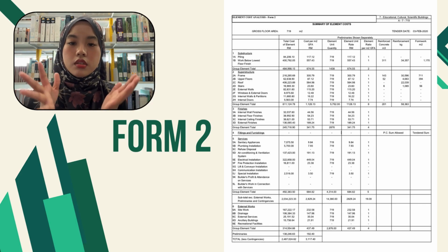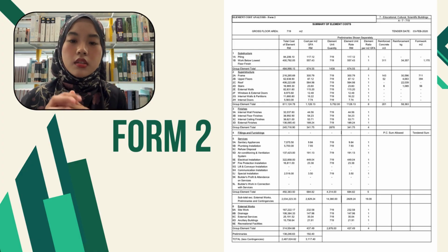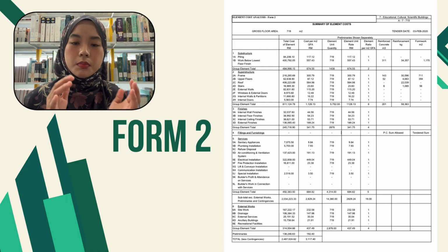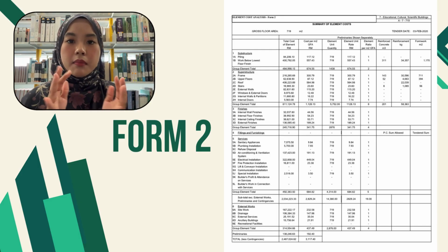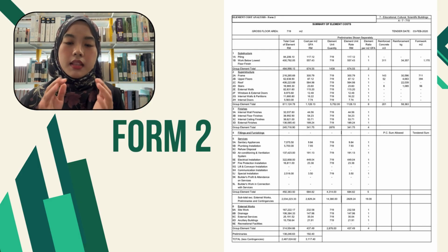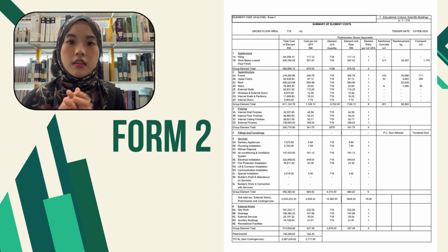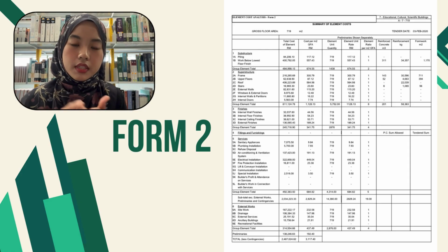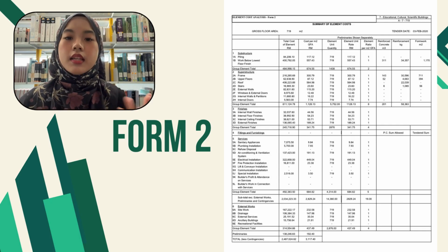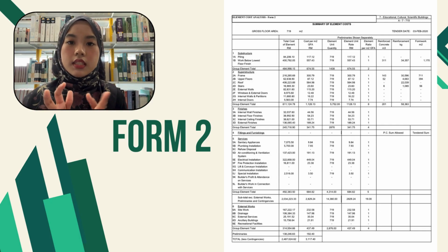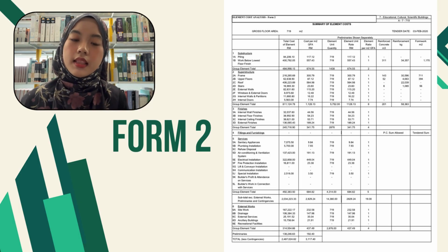Each row shows the total cost of the element and the cost per meter square, and the elemental quantity, usually the floor area, and even details like reinforced concrete volume, formwork area, and reinforcement weight. This allows for detailed analysis at both the summary and technical level.